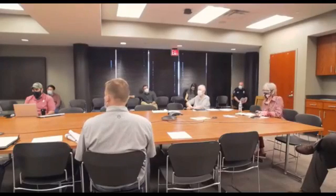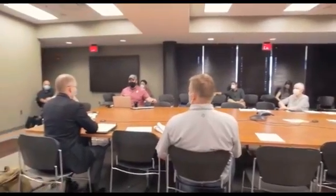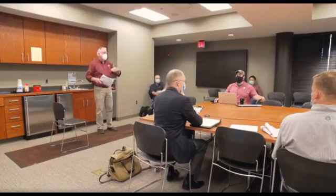No, I think that's what we are taking to learn. I think there's 2 pieces, and break it into manageable areas. And I think getting started in spring right now is better than when we get pushed into the fall. It's kind of managing that part. The other one, we've had a lot more pre-engineering on our staff, digging down into it. And the plans that will be going out right now are a little bit more detailed, simply because we've got more data. I think that'll be the next lesson learned, is to do a lot of that. And then as we get into the south half and over in Rolling Hills, we need to start some of that investigation now, not wait till construction's over, because that takes time.